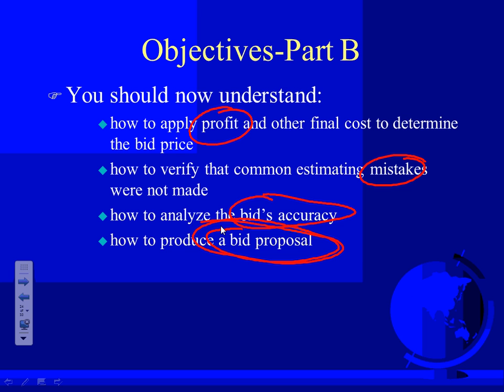Pay attention to E for each. If there is C, you divide by 100. If there is M, you divide by 1,000. E is each, and C is 100. Okay. All right.